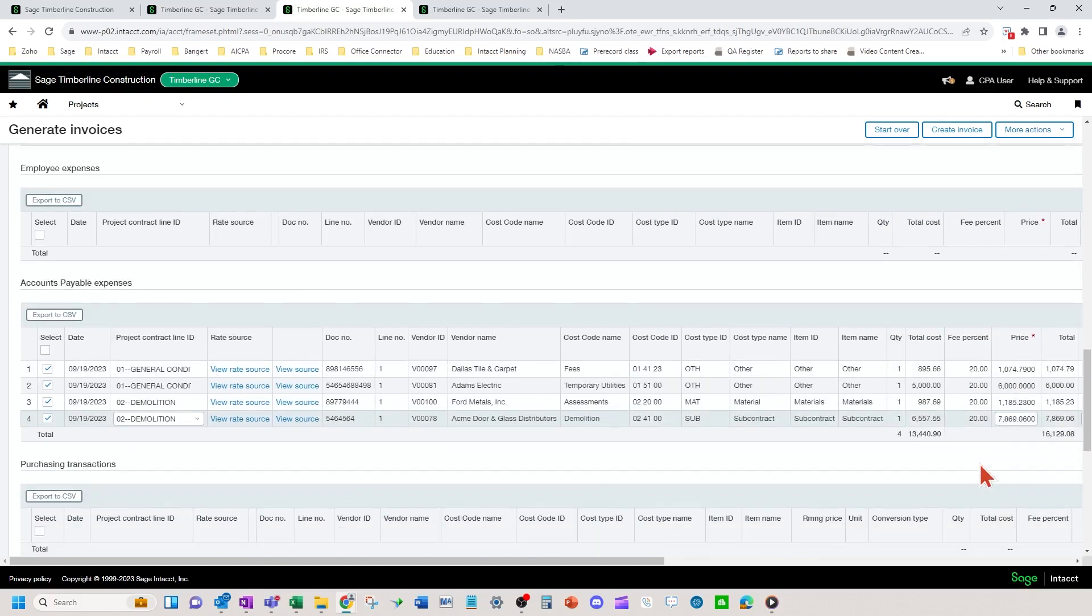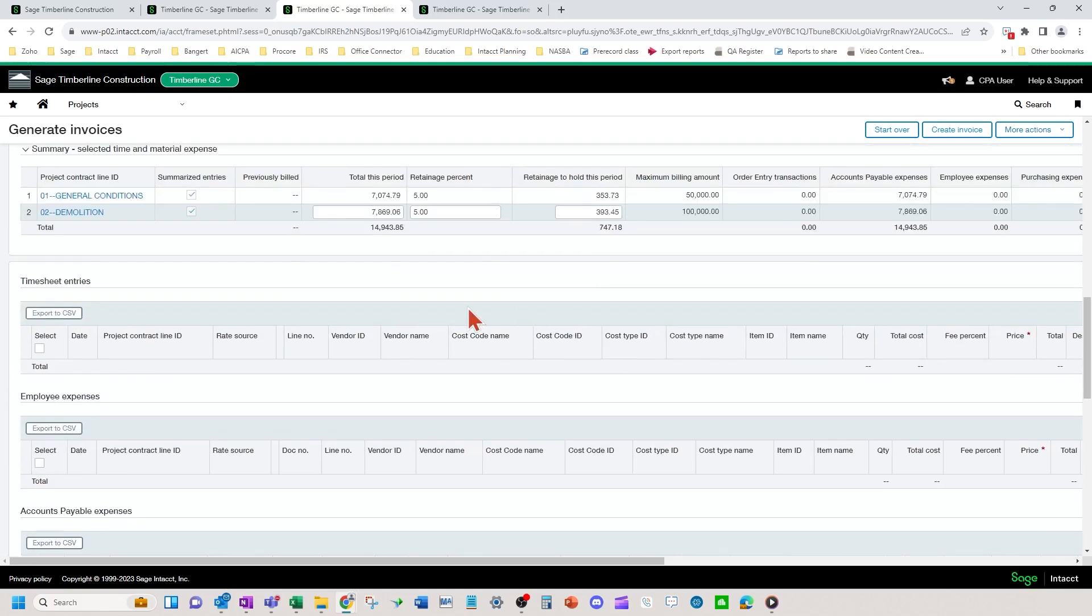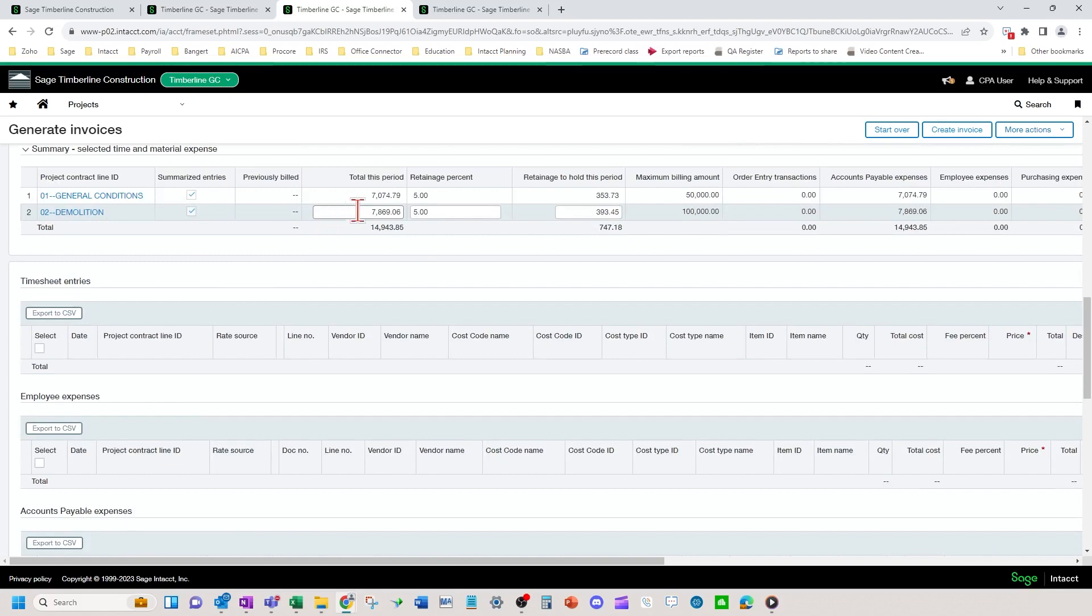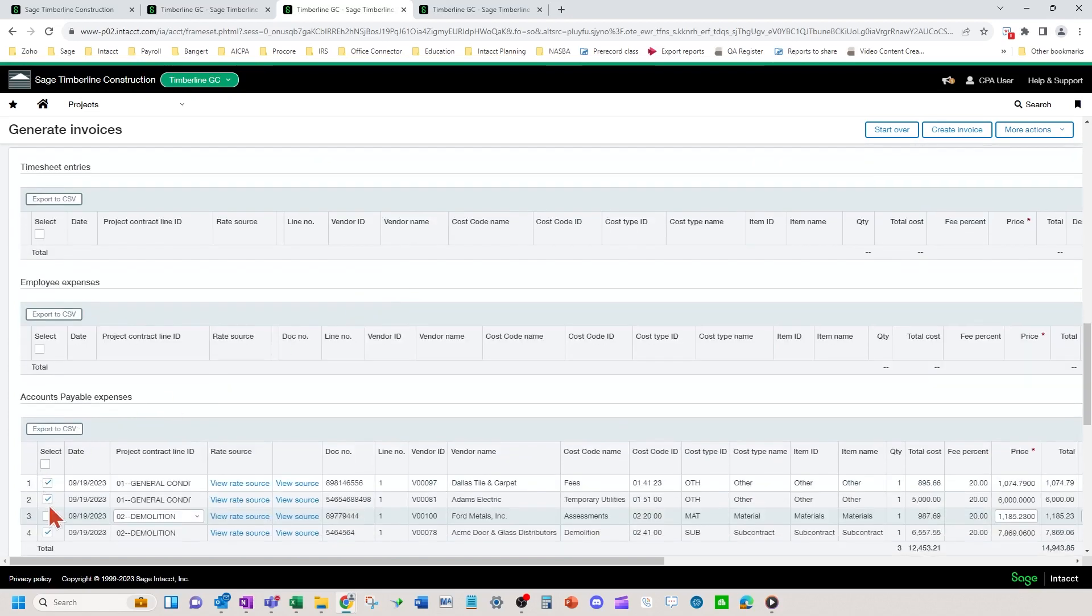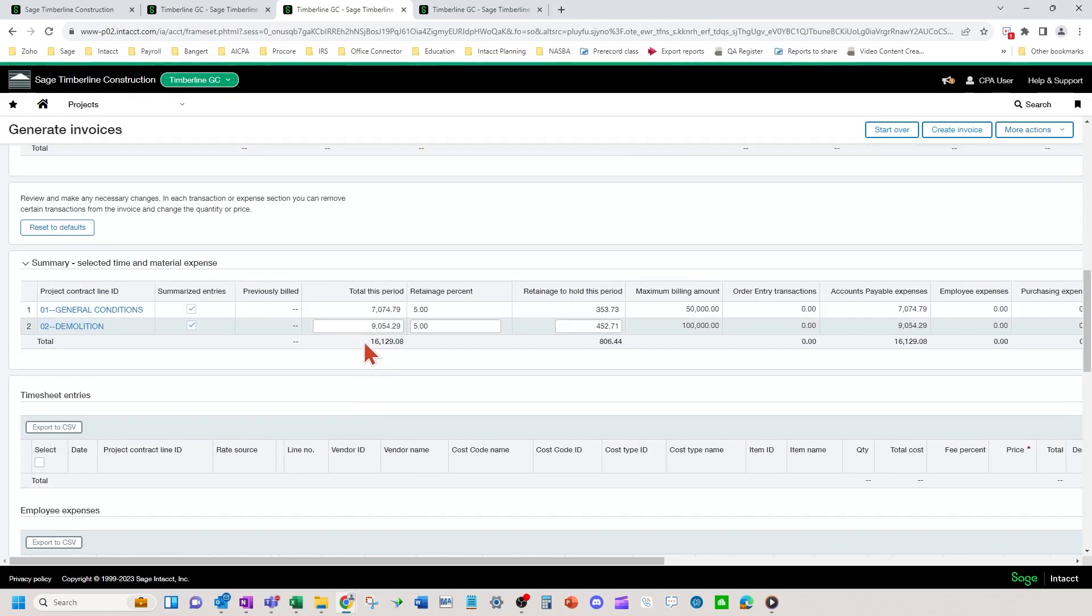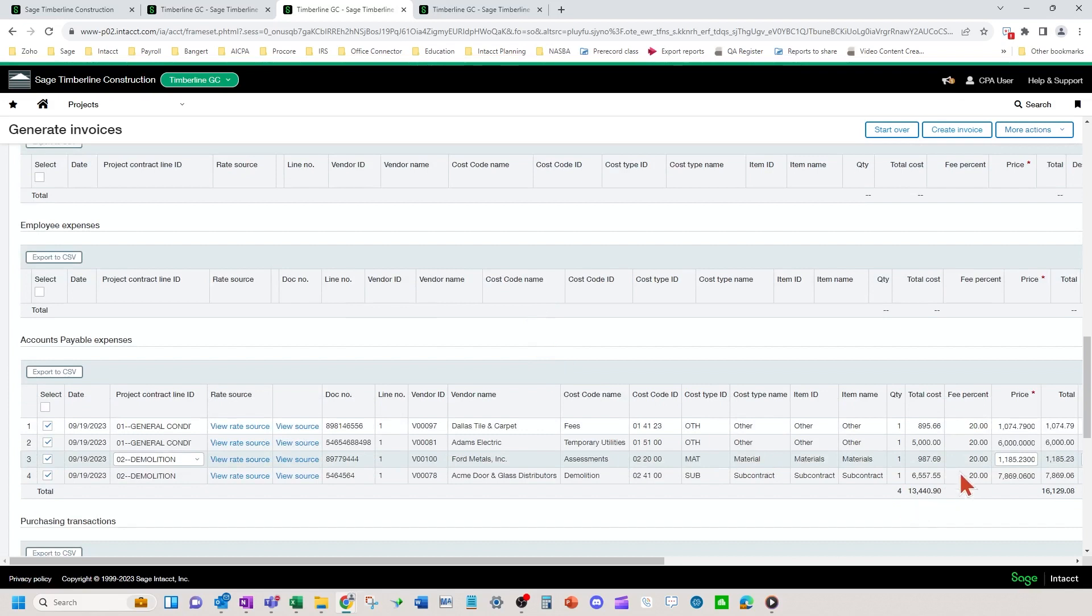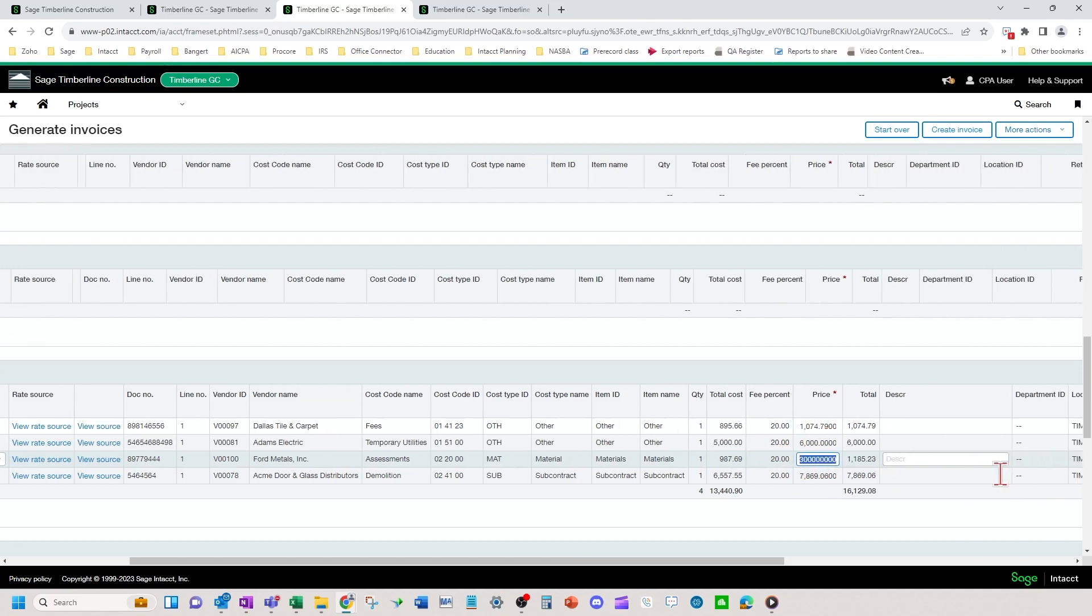So you can adjust and take off a line if you want to, it's going to adjust it up here. And you can also adjust your prices down here as well. Also, you can adjust it in total up here. Don't recommend too often adjusting in total up here because you'll lose visibility as to what you were adjusting when you look back and want to look at the history of why you adjusted something. It's better to adjust it at the line level.